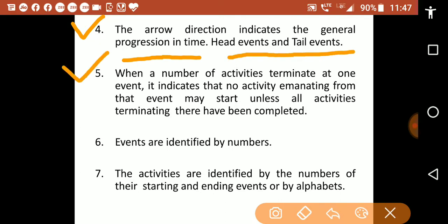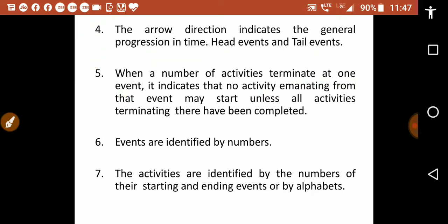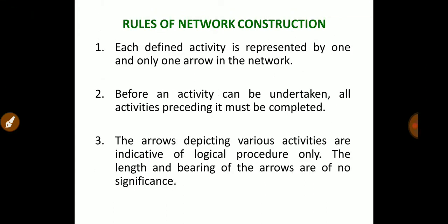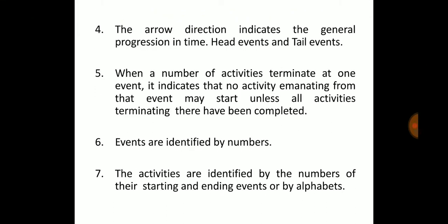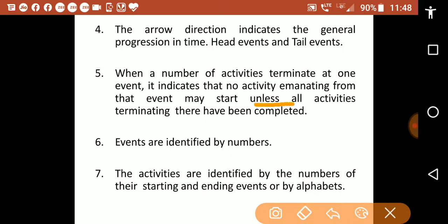Fifth, when a number of activities terminate at one event, it indicates that no activity emanating from that event may start unless all activities terminating there have been completed.